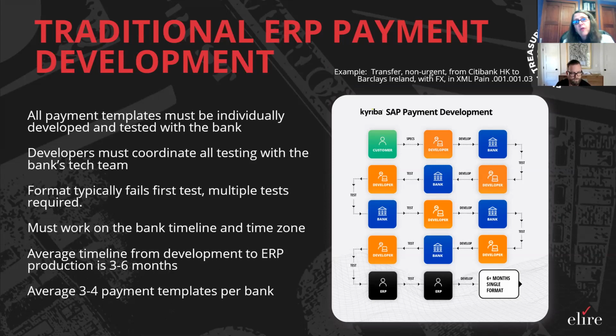We have also heard from numerous organizations that bank connectivity is often forgotten about in an Oracle Cloud migration. It's the last thing folks think about. It's typically an IT-initiated activity, and IT isn't thinking a whole lot about bank connections. So we'd encourage you to get involved early and remind folks that bank connectivity is really important, because we've seen that a lot of the tests fail the first time around.